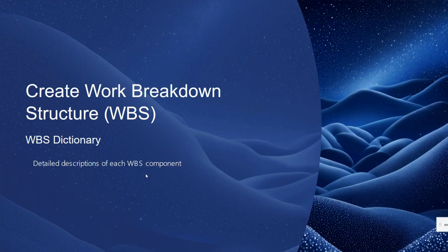Under WBS, we will define the WBS dictionary. In a WBS dictionary, we will provide the detailed description of each WBS component, including the scope, resources, and responsibilities.